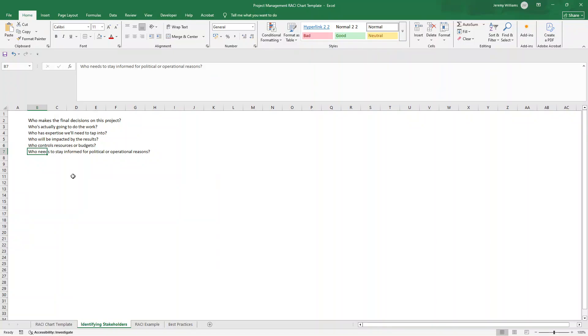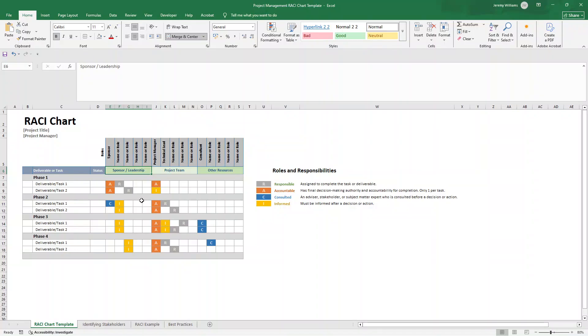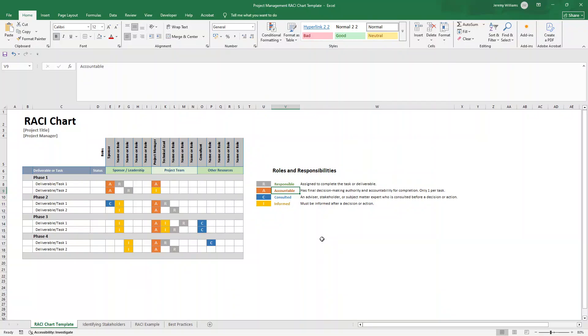Then you need to organize them into logical groups. The logical groups are going to be your sponsors and leadership. These will likely be your executives, department heads, or project sponsors. They are usually your A, your accountable parties for major decisions and deliverables. Next, you have your project team. This is your core working group. These will be the people actively managing and executing the project. So as an example, your project manager, a technical lead, or a business analyst.